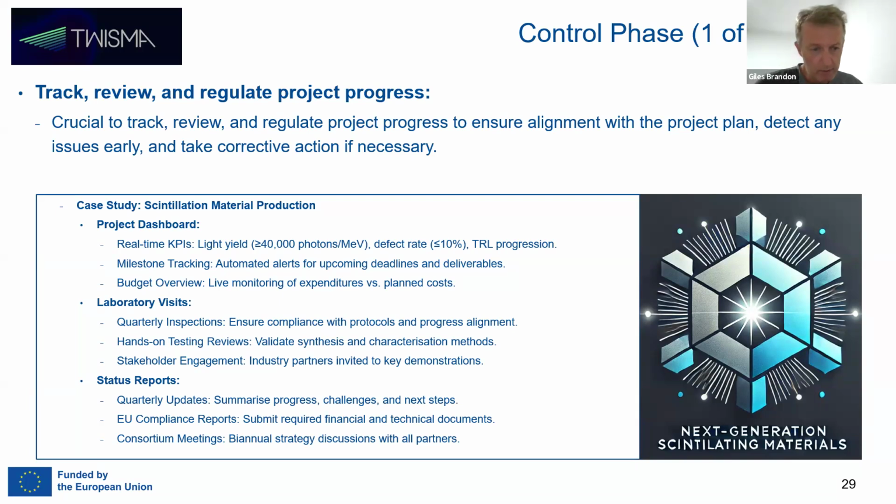Status reports. So yes, we have status reports that need to be done formally to the Commission, but also it's good to have some sort of status reports for internal consumption. So maybe these are done on a quarterly basis. The work package leaders potentially summarize what their progress is, any issues, and so forth. EU compliance reports, yeah, at the midterm and the final review of the project, the financial and technical information needs to be provided to the Commission.